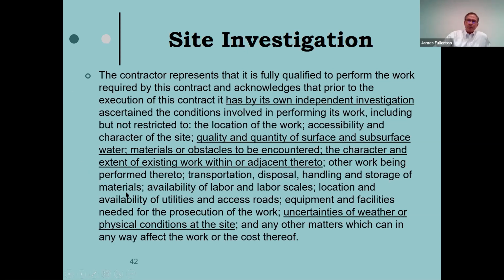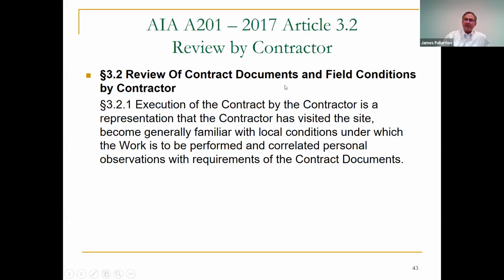So you need to be careful with this. You don't want to agree that you have ascertained all of the conditions involved in performing the work. I think this language in a contract is troublesome. You would rather have it read, this is the way an AIA document reads, you have visited the site, you're okay with that, you're generally familiar with local conditions, and you have looked at the contract documents and the work to be performed, and it makes sense in my observation and in my experience, this makes sense.